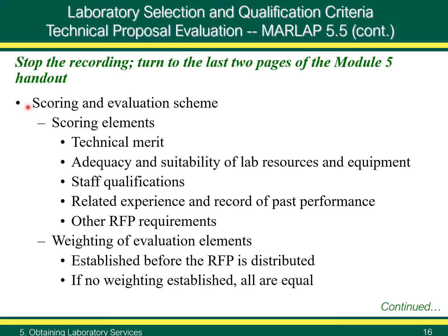MARLAP Section 5.5.1.1 addresses the scoring and evaluation scheme. The RFP should include information concerning scoring proposals or weighting factors for areas of evaluation. This helps the laboratory to understand the relative importance of specific sections in a proposal and how the proposal will be evaluated and scored.